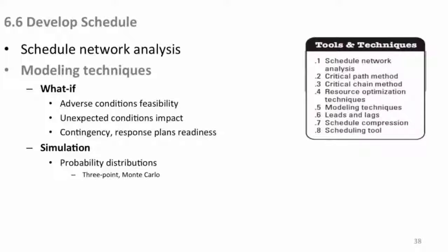They're like the 3-point estimations. They're simulations of estimates, especially Monte Carlo, which you need a computer to do because it does hundreds and thousands of iterations to try and optimize the best schedule given the inputs you give it. So these are other ways of modeling to determine just what is the best arrangement of our resources and the times and the durations to achieve our end date within our requirements.